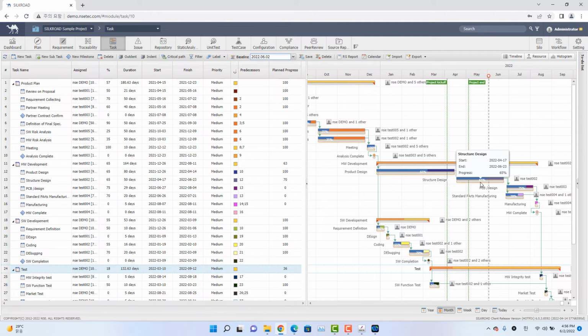then there will be saved data marked underneath the progress bars, underneath the Gantt chart, like their shadows. This is provided to show you the difference that's made to the chart as time goes by, and find out which has changed from a specific date or from a specific moment to compare the differentiated part. The ultimate purpose of this function is to help users compare the original plans with the one that has changed.